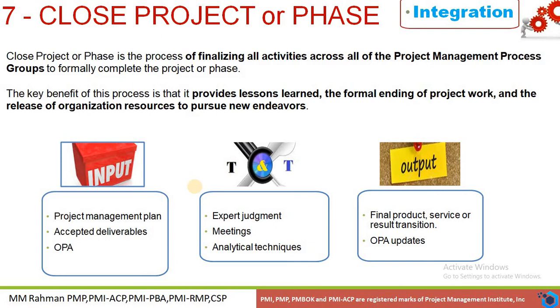So what is the purpose of this process? This process is used to finalize all activities across the project management process groups to formally complete the project or phase. The key benefit of this process is that it provides lessons learned, the formal ending of the project work, and the release of organizational resources to pursue new endeavors.